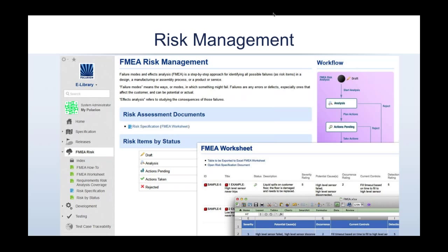You can choose what it should contain. An example can be to add some description of the event, the date identified, likelihood, severity, priority, owner, action, status, whatever you think is enough. So don't make it too extensive. Unless you work in a regulated environment, because in this case you really need to define risk documents.